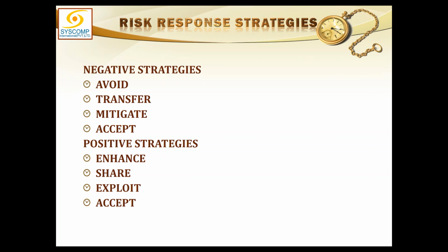And last is acceptance again. Even in positive strategies, if you cannot enhance them, cannot share them or exploit them, then you have to accept them as they are. Whatever benefit comes your way, you will accept that. But you could not have taken any of the other measures than acceptance.